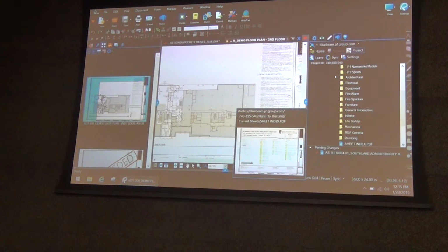Before you extract all the drawings? No, first we label, then we extract, then we put them in folders, then we run batch link. It's important because you can't move them after they're batch linked, or you break all the hyperlinks.